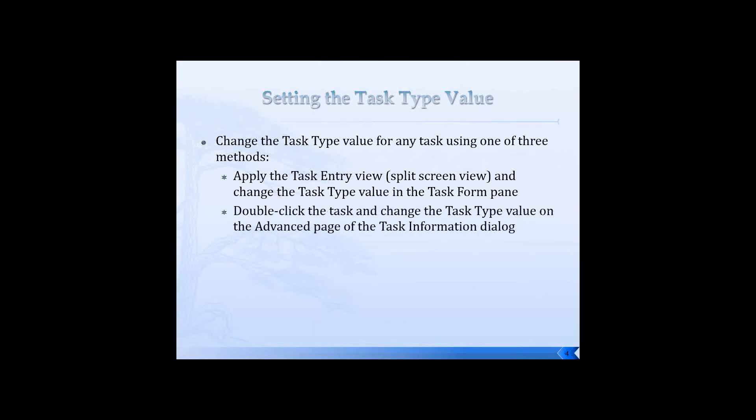Another way to do this is you can double click the task and then change the task type value on the advanced page of the task information dialog.